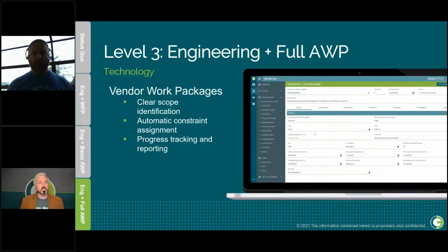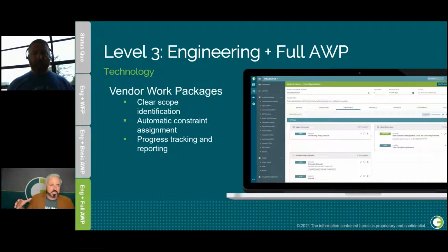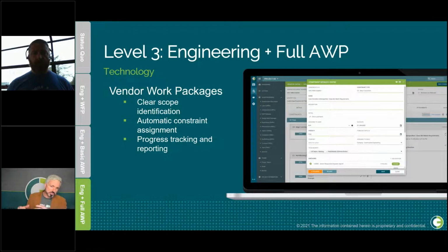And it's really valuable to take these, what are pretty wide open engineering work packages, these large level 3 schedule activities, and being able to break that work down into smaller discrete buckets gives you this better visibility. It gives you this better progressing, right? It moves you towards a meaningful progress. If half of my drawings are done in the EWP, what does that tell me? Can I work on anything? How does that align with what my construction requirements are? How does that align with getting done with specific components of that design piece? Giving additional visibility and discrete packaging of that is really valuable from a progressing and tracking perspective, and moving away from, hey, we're 99% complete on this EWP, but we can't do anything.